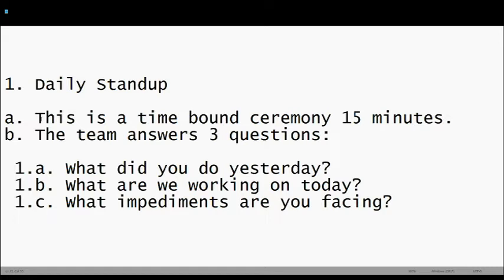What impediments are you facing? Now, the daily stand up is very important for a scrum master, because once dependencies come up, it is your job to make sure those dependencies are, first of all, mentioned in that story in Jira or ClickUp, whatever tool you use, and we will go into depth on that in part 2 of this video. They have to be mentioned. In ClickUp, we write comments: okay, this is a dependency, and then we connect one story to the other, whichever is dependent on whichever. In Jira, you can connect 2 stories.